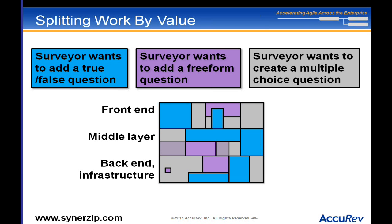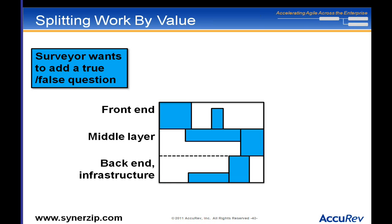I have three user stories for an online survey system: the blue — add a true/false question; the purple — add a multiple-choice question; the gray — add something else. Each requires a little work in the front end, middle, and back end. Normally from a development efficiency perspective I'd rather do all three together — no rewriting code, think things through — but from an economic perspective it makes more sense to do the story I most need first, because I want to validate that I need to keep going in this area.